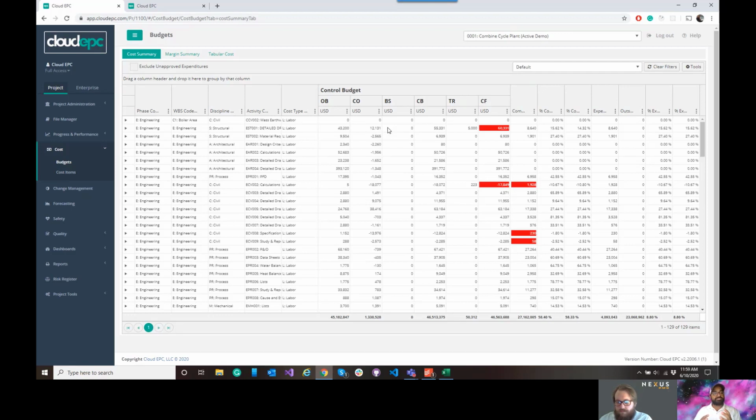Going back to the example, we may not load that level of detail if we're working with an investor as Nexus PMG, but when we are aligned with a contractor and we're tracking at an atomic level, or even let's just say at a drawing level for every isometric, we have to be able to take off the hangers, the pipe, the number of welds, and load all of that into our progress tracker. The system affords us the ability to load both of those different levels of detail and be able to track them, as well as aggregate them back into our budgeting structure.